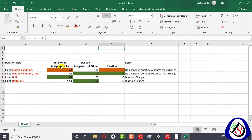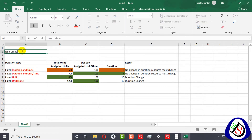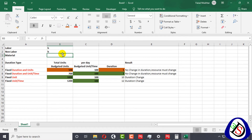For Fixed Duration and Units, both duration in days and units are fixed. Units are measured in hours — when you talk about labor or non-labor resources, they are measured in hours. If the resource is labor it will be in hours, if non-labor it will also be in hours. If it is a material resource, it can be in cubic meters, square meters, kilograms, or any weight or volume unit.